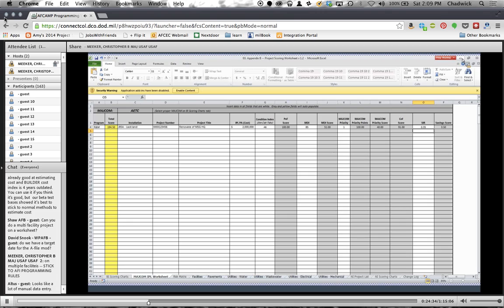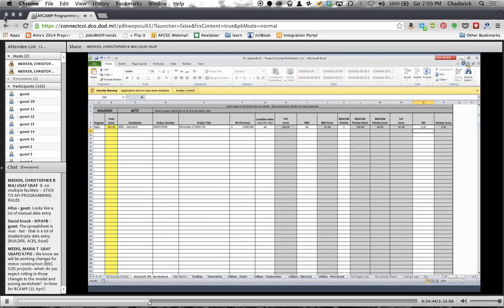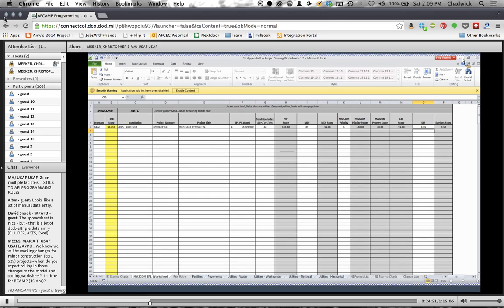The BCI will take into account every part of the building. I mean, basement walls, foundations, structural columns, and I have a good feeling you're probably not going to replace those as well. Also, like I mentioned, we're not entirely confident in that roll-up value that we've been seeing. So BCI is off the table for the sake of the FY15-16 IPL.